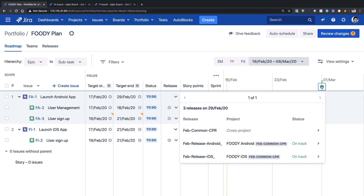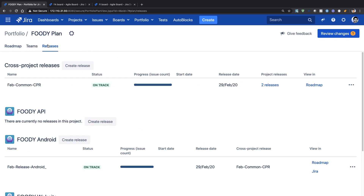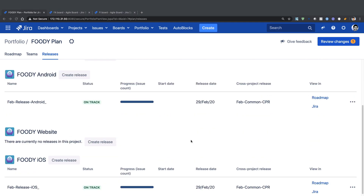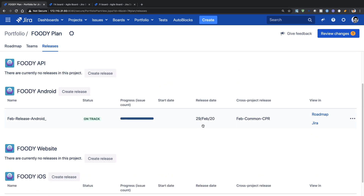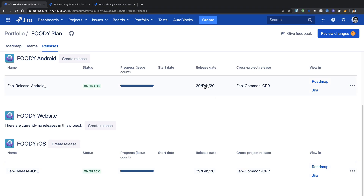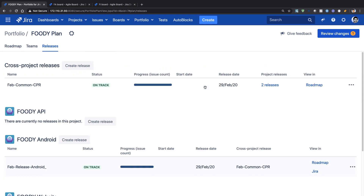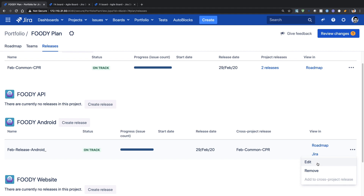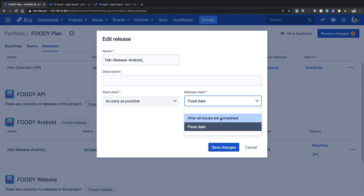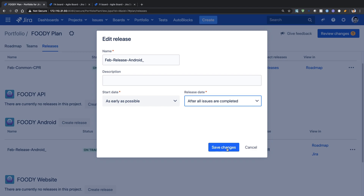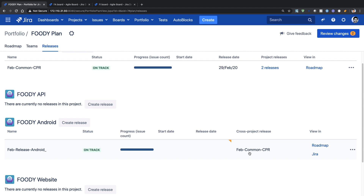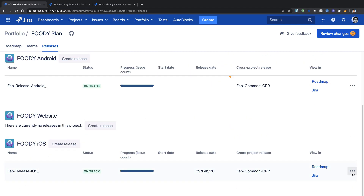If you schedule user signup slightly before the finish date of user management, you will get visual alerts, which you can fix quickly by scheduling the start date of your user signup functionality later. You can see on the plan that we are releasing something on the 29th of February. If I go to the release tab, I do have this release date for my Android and iOS project. For now, I will modify my Android release for February and instead of a fixed date, I will select 'after all issues are completed', letting Portfolio decide the date for me.